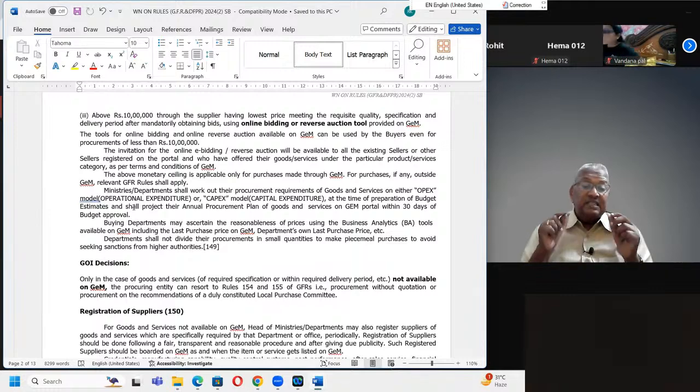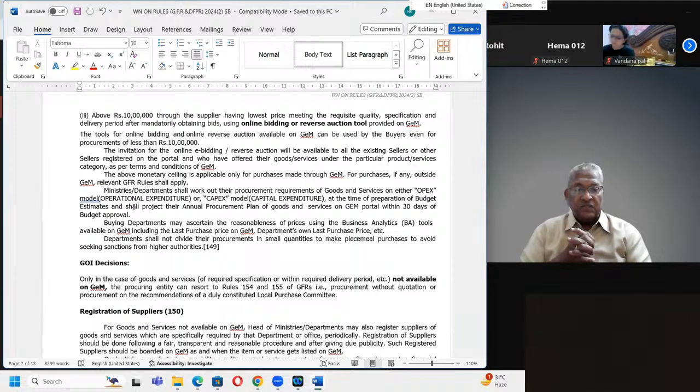So this is actually circumventing the rules. Not following the rules, you are cheating. You are cheating. Such breaking of the requirement into small quantities and then buying is not proper. It is against financial proprieties.